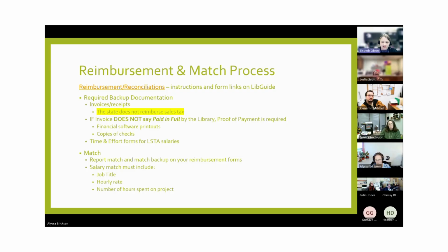If we decide to omit a category, do we also need to submit a project adjustment? Because then you're zeroing it out. And if you're zeroing it out, it feels like maybe the intent and the outcomes might be affected. Yeah, but definitely we can have conversations about that specifically and work through it so you have a plan before you start purchasing. So that's the time to try to figure all that out. If you think things are going to change before you get into the purchasing, let's have a meeting.